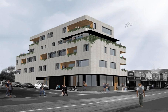I suppose lessons learnt from me personally would be really the fire rating mechanisms and the scrutiny that timber buildings are copping in Australia. We see conventional builds that have nowhere near as many fire rating mechanisms involved as a timber building, whereas in reality some timber buildings actually would perform better under fire duress than a standard construction. So from an estimation and a pricing point, I think it's important that people really do their research and understand what the fire engineer is going to want and what he's going to require if you want to do a multi-residential timber building.